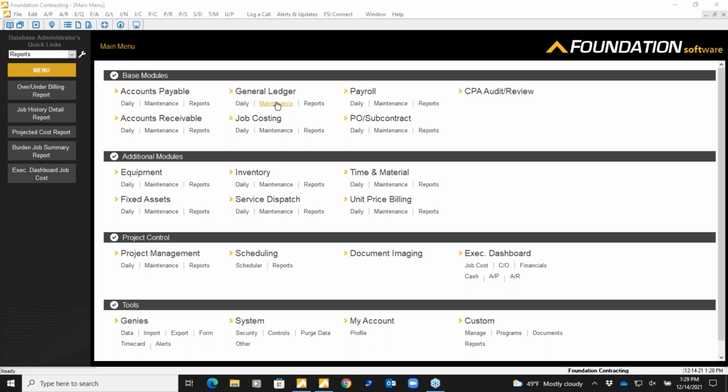That ensures that all direct costs go to job costing and aren't forgotten. So all the expenses for the job costing report should go through the ledger if you are up and running. That would be a way to make sure that people don't forget the job cost. So all the expenses should most definitely go through the financials as well.